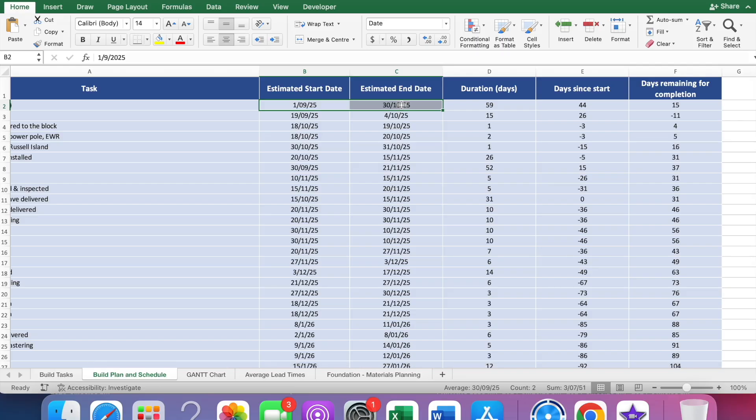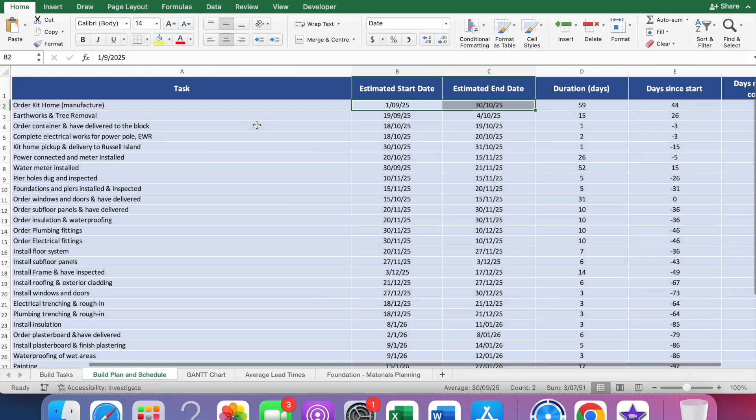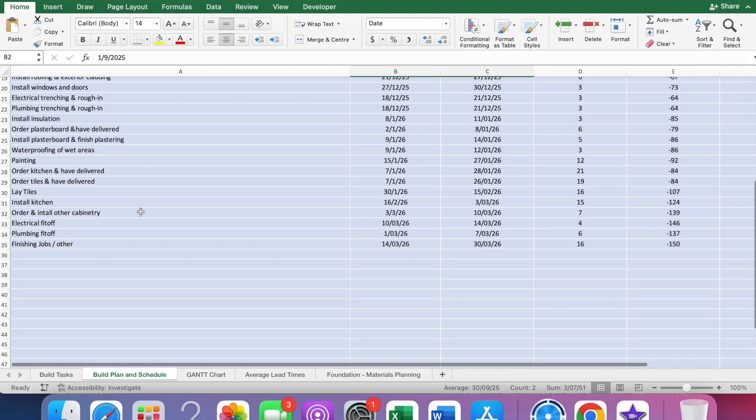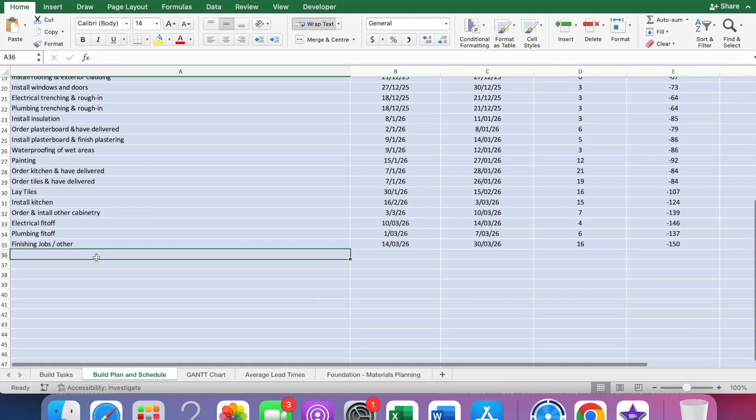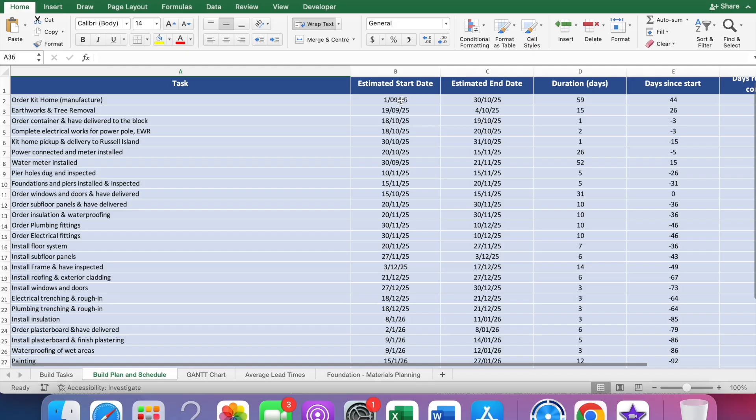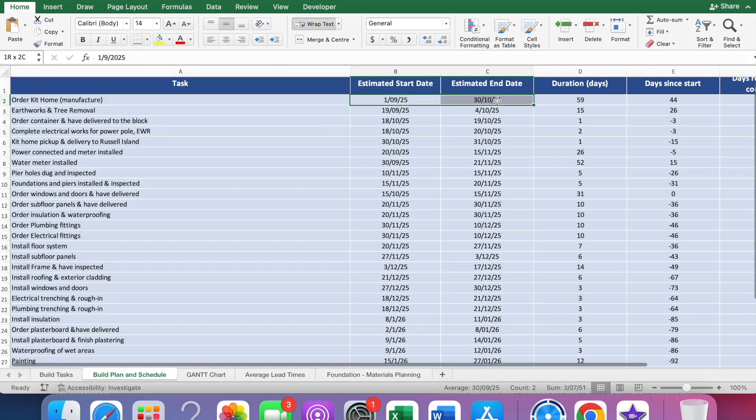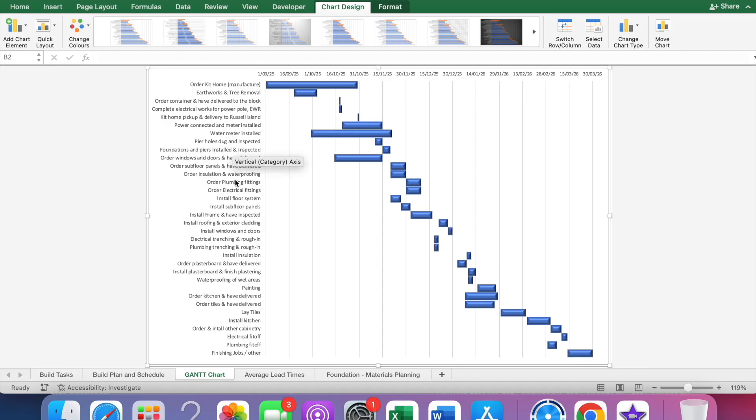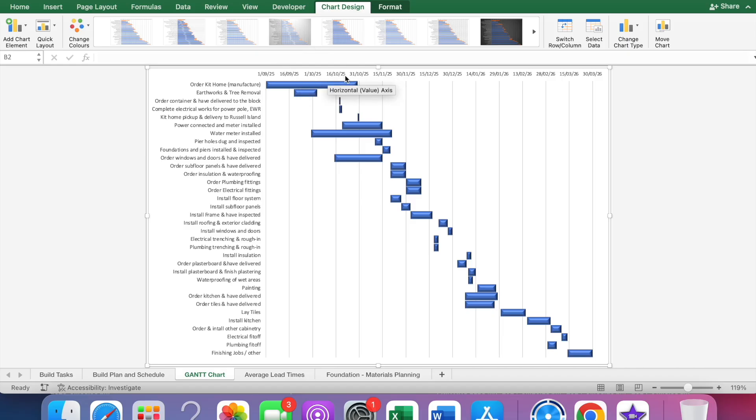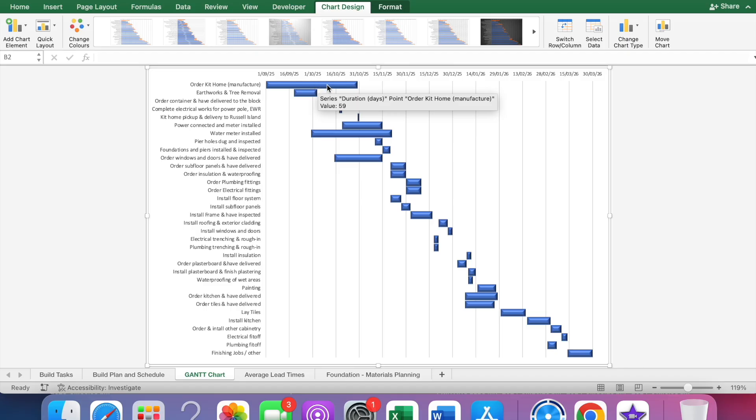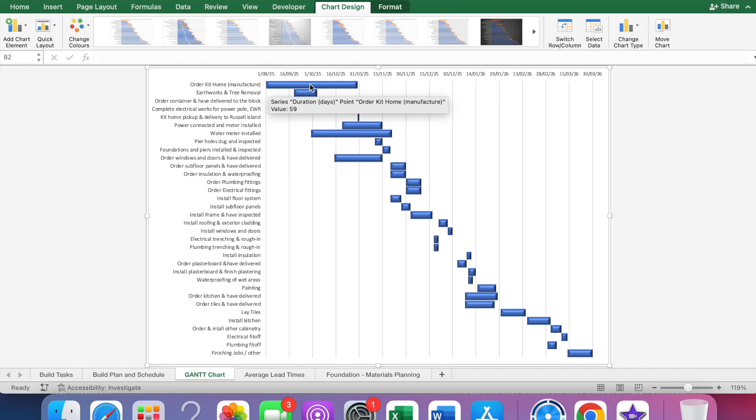This is based on our build, so obviously it will be specific to us. I've put in all the tasks - the big tasks for the build that I could think of, the estimated start date, the estimated end date. These are the only dates you'll need to enter. You can also add different items here if you think of other things relevant to your build. All of this information will update into this chart here. It's called a Gantt chart.